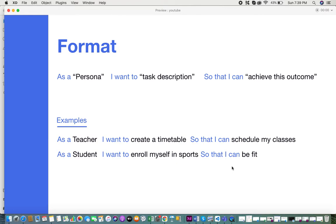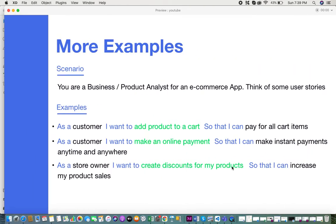Now let's look at an example where you work with a product. Let's take the scenario of you being a business or product analyst working on an e-commerce application. What could be real possible user stories? First: as a customer, I want to add a product to a cart so that I can pay for all cart items. Second: as a customer, I want to make an online payment so that I can make instant payments anytime and anywhere. Third: as a store owner, I want to create discounts for my products so that I can increase my product sales.